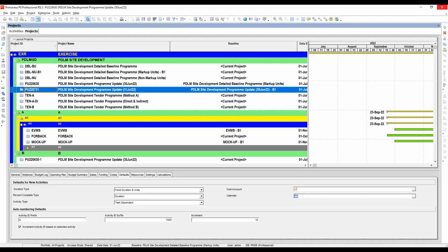Actually, it is simply the method of exporting an update layout from Primavera into an Excel file format, and then updating the progress and actuals in the same Excel file. And then after updating in Excel, we have to import the updated Excel file back into Primavera P6. So that is the procedure, but we will be taking that up later.